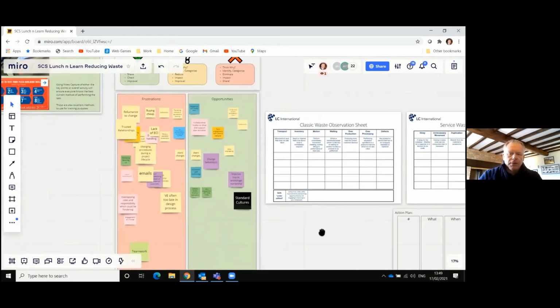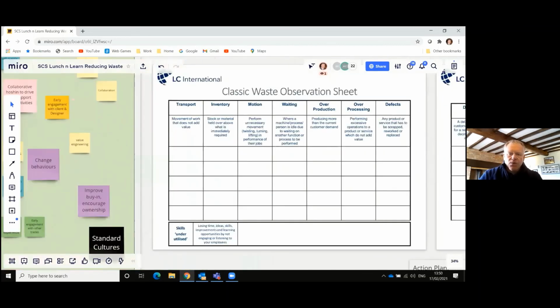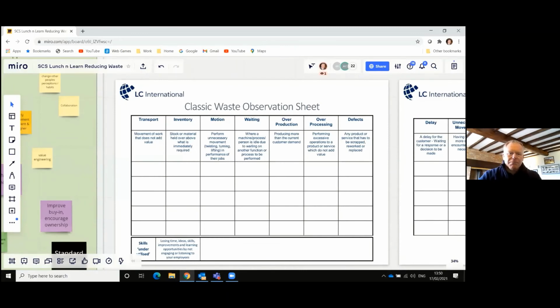Once you've done that with your people and your teams, categorize it in these wastes, and then agree as a team how you're going to start to manage the improvement or challenge those issues you're facing within these wastes. So if it's a transportation issue, bringing the materials on site, think about how you're working with your logistics suppliers. Think about how those materials are being brought on site, how are they staged, where are they placed? Are they placed where they're needed at point of use, or are there movements that you have to make as a business to get them to the point of use?